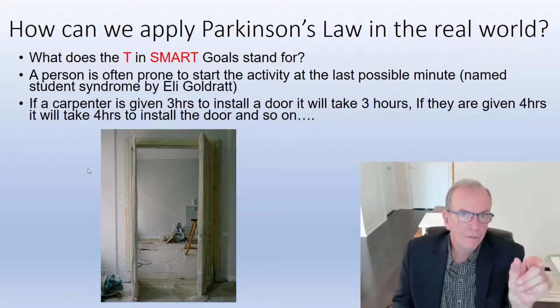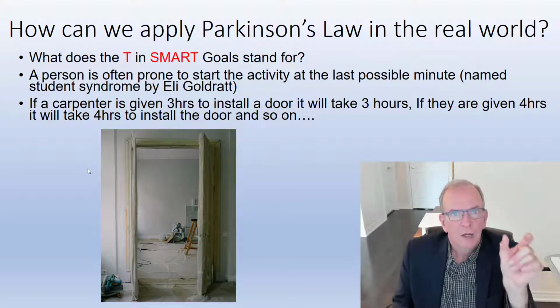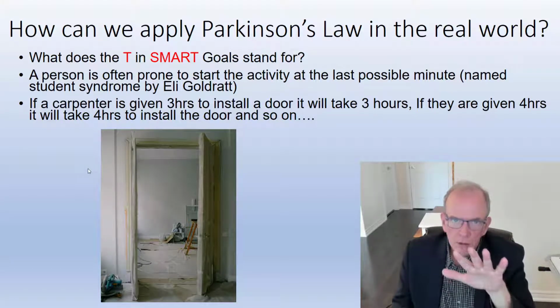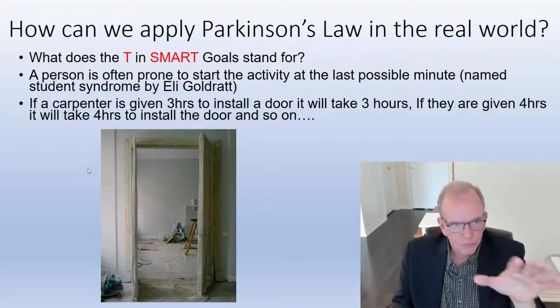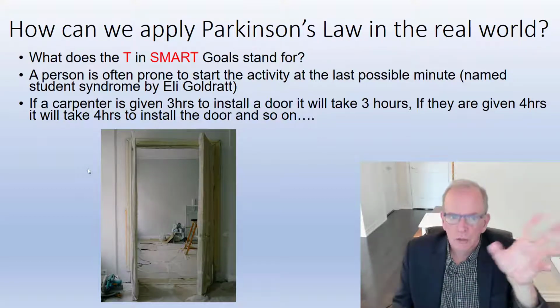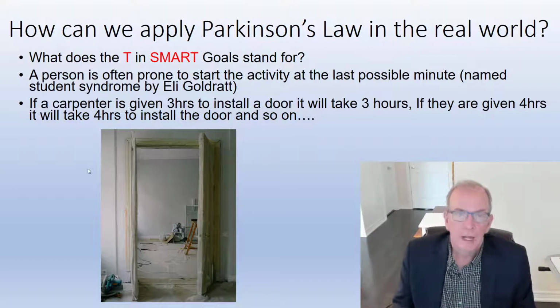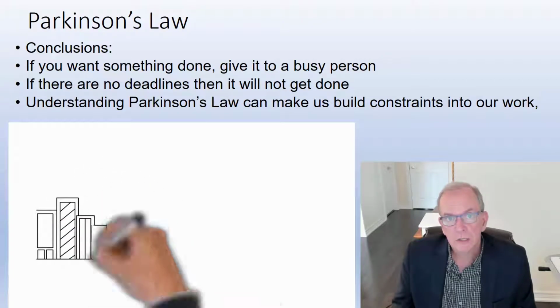Better to have, and we'll talk about this in another video that I'll do, but better to have urgent time periods that really require focus to accomplish, but you can accomplish them, right? They're not unrealistic. That's tying to the SMART goal aspect. And having a buffer later on that can catch oddball things, unknown things that happen. And that's an effective way to use Parkinson's Law to your advantage.